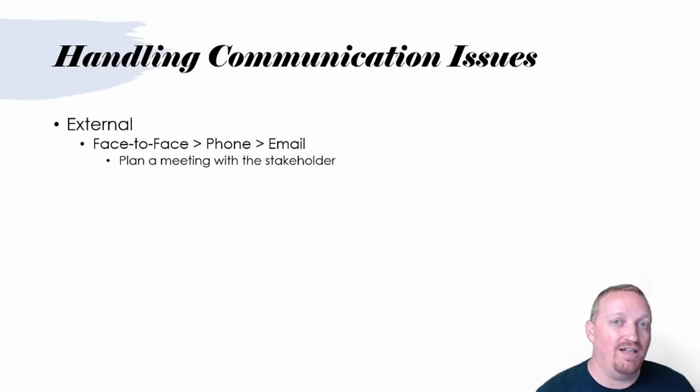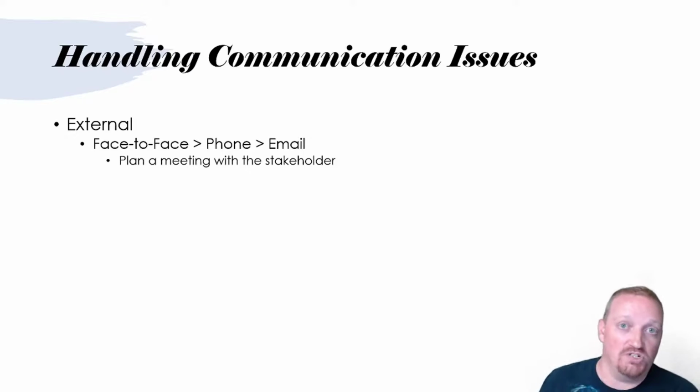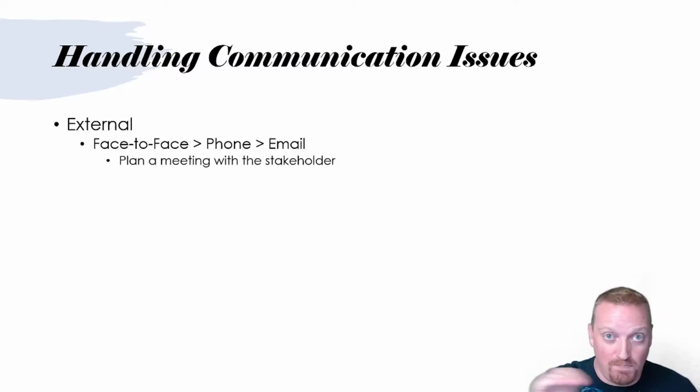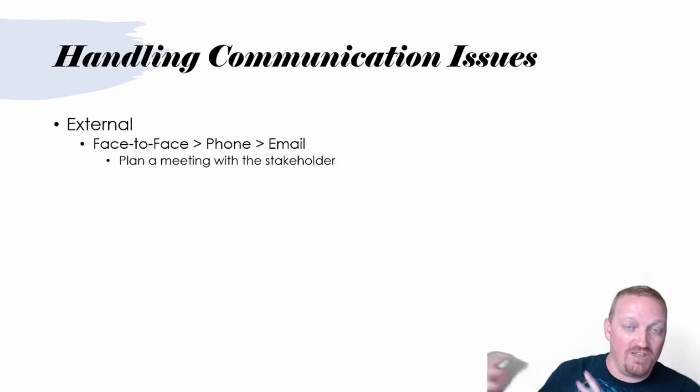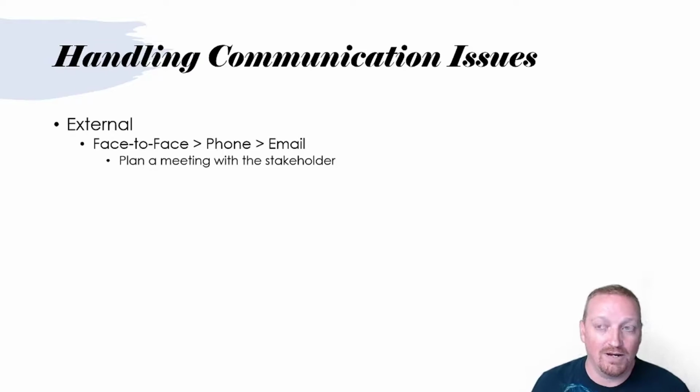Well, you could still have that story being worked in this current iteration, because as soon as you resolve that, you can pick up the story right then and there. And then it essentially becomes just the baseline effort, right? You've turned that story from a 4 into a 2 as soon as you have the meeting. So that's why it's okay to have a 4-point story in my rubric. It's okay to have at least just one dimension of difficulty.